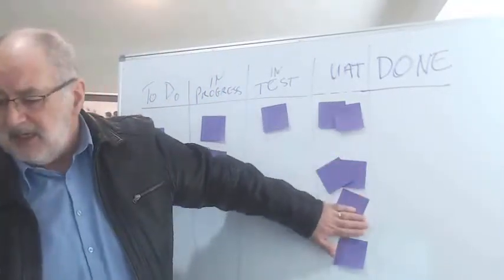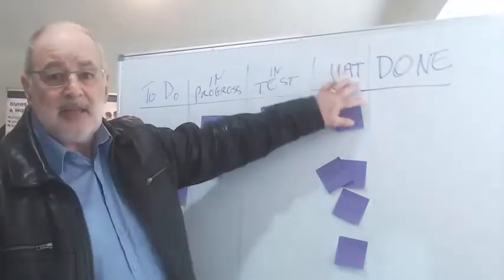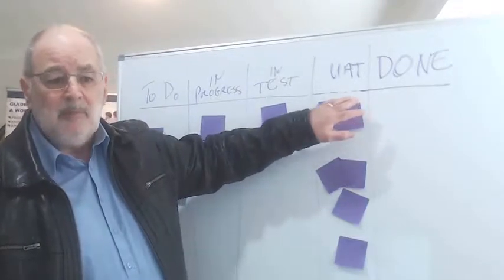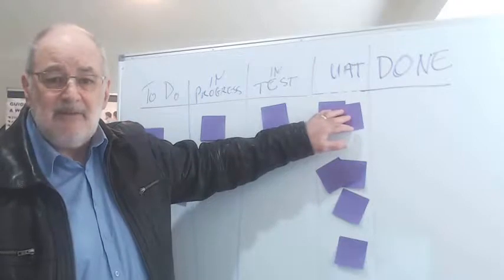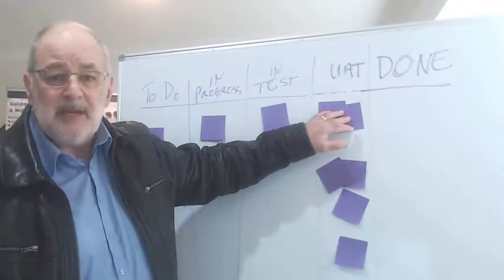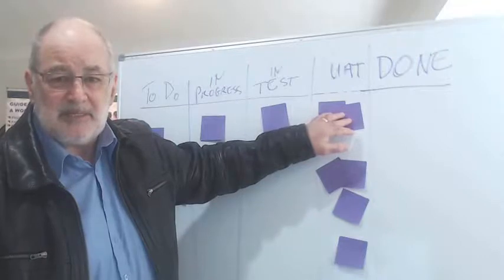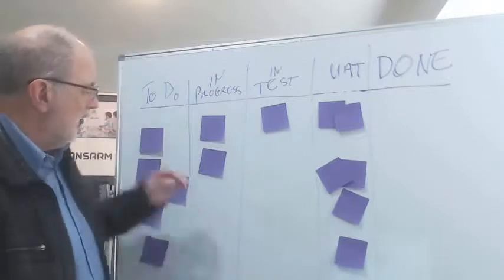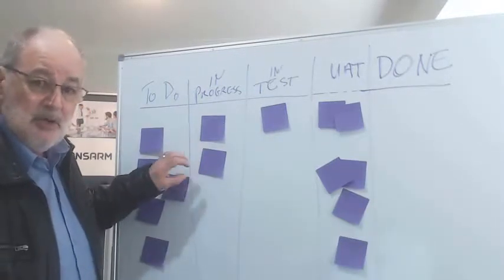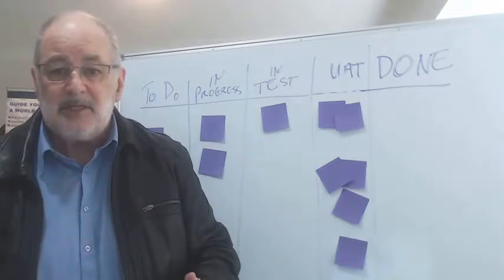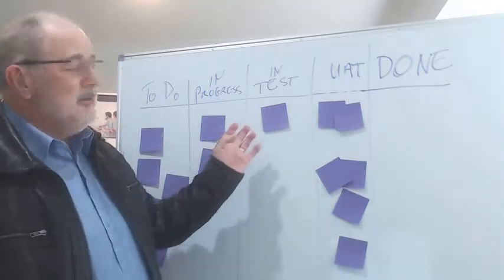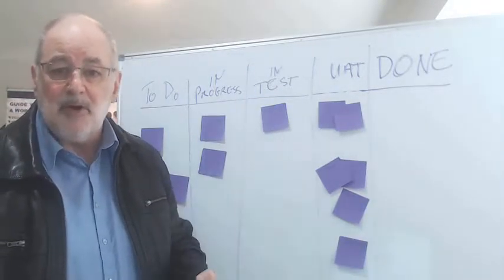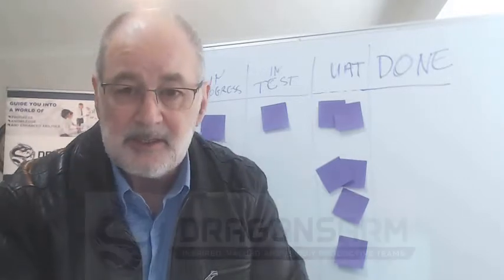So we need to get that out of there. So, stories and bugs, nothing. Take this off your board. It doesn't belong there. User acceptance test can never fail. Only new bugs and new stories can come out of user acceptance testing. They can be prioritized as necessary and brought in either immediately as a new item on the sprint in negotiation with the team, or in another sprint, or a little later on, as a priority that is required later is decided upon.